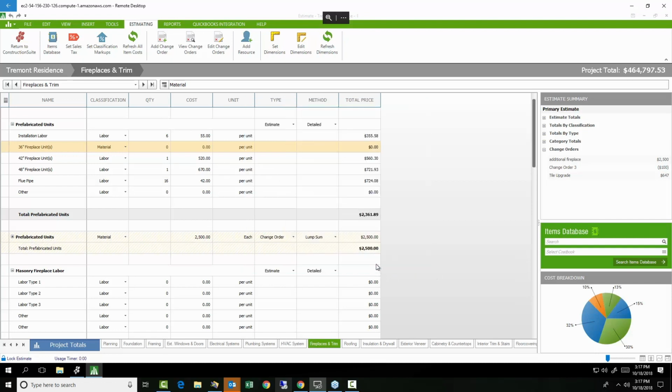Absolutely. And like he mentioned, this is going to help us account for all of these things without having to worry about going into and manually adding in all these additional costs. Now, if we're going through and building in an estimate accurately, one of the first things that you have to do, especially for things like labor, is go into and put in the expected cost without any fudging of numbers. And what I mean by that is if you pay your guy $25 an hour, the unit cost should be $25 per unit, the quantity should be the number of hours, and the unit itself should obviously be per man